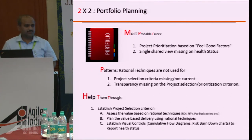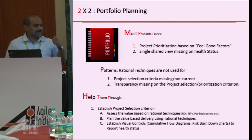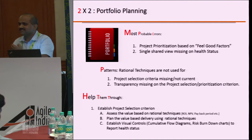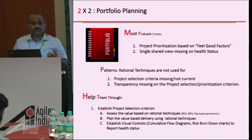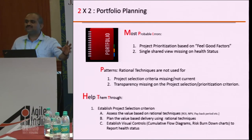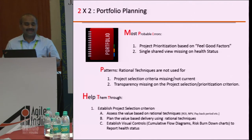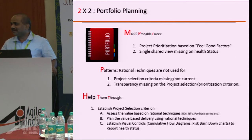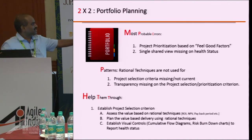As an Agile coach or practitioner, you need to bring that transformation. First, assess the value using techniques like return on investment, net present value, and payback period. Second, plan the value — go and ask what value is being generated out of this particular project. Do a value stream mapping exercise, identify value-added steps and non-value-added steps. Then deliver value. Use techniques like cumulative flow diagrams and risk burndown charts — make sure they are available on the walls, not just on a scrum master's laptop. It should be clearly available on the boards so that people themselves can know. This is how you can mitigate these two errors.